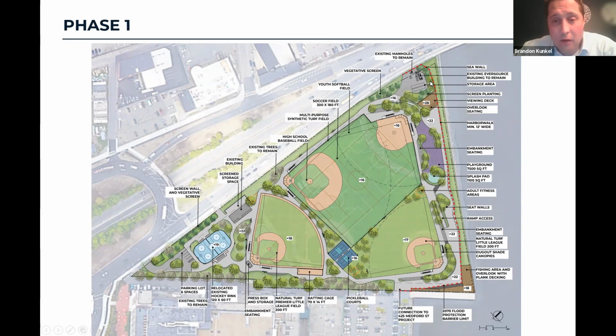They also need to be able to get a vehicle in there to service and maintain the power that comes into that building. And I'm sure you folks are all aware, just much more than we are, this service that's coming across underneath the Mystic River is serving all of Charlestown, and that's why it's a big deal to attempt to move it. They would have to cut the power, so folks would be out of power for periods of time. Not that that's impossible, but from a financial perspective, it makes it really, really challenging.